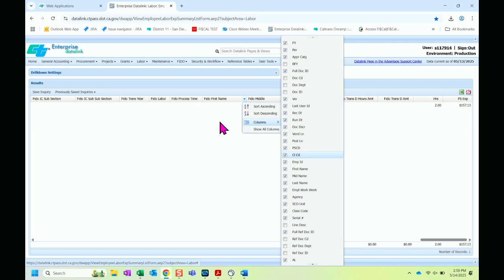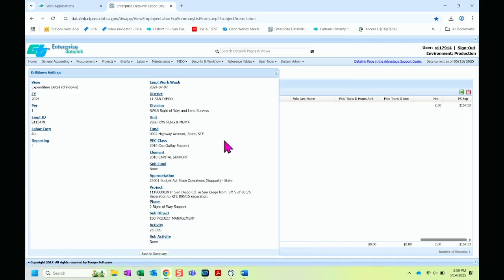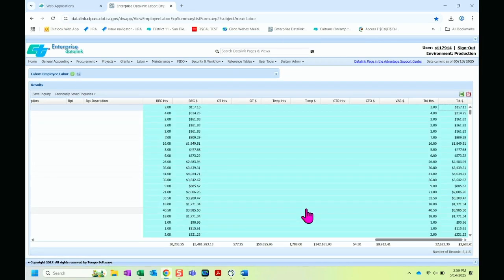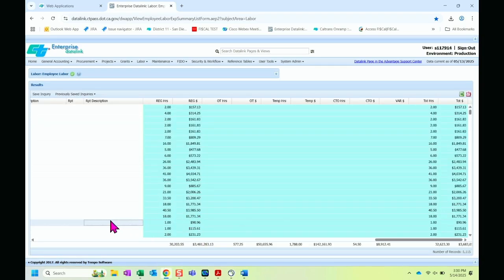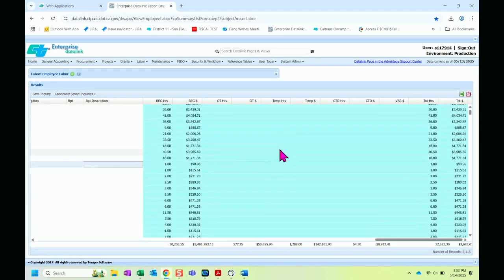The other thing, can you go back to the summary? This is loaded rate. So highlight the one for 1 hour for $90.96. Just there. So this employee for 1 hour charged, and it shows $90.96. I wish we all made $90.96 an hour, but that is our loaded rate, right? So when you're doing your project cost reporting, that's how much the project is getting charged with benefits.